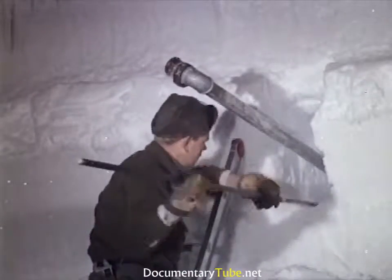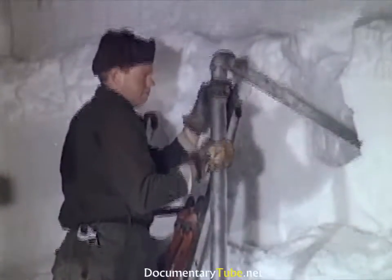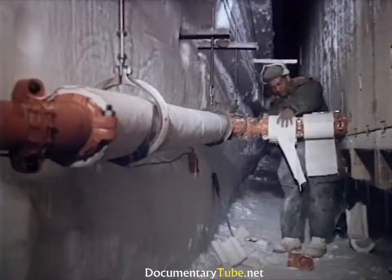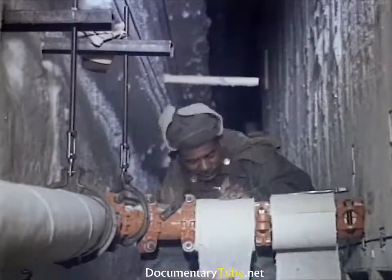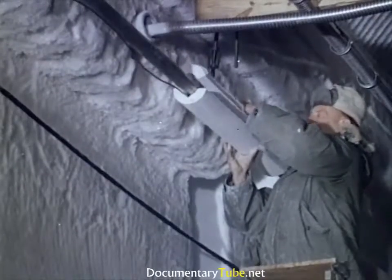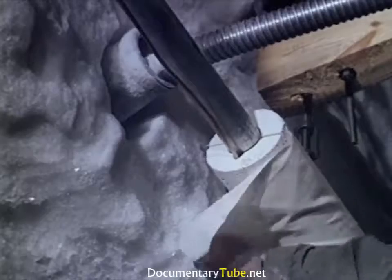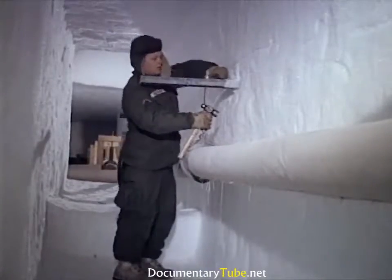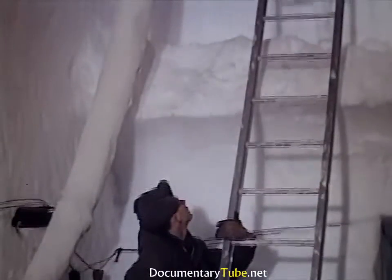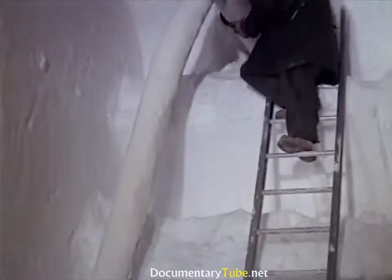At this same time, within the tunnels already completed, we were installing piping for water and electricity. Heavy insulation material was wrapped around every pipe to protect against the extreme cold. A copper heating element inside the insulation kept water lines from freezing. Flexible sewage lines also had to be run through the camp. At this time, to keep on schedule, we were using 12 and sometimes 14-hour shifts.